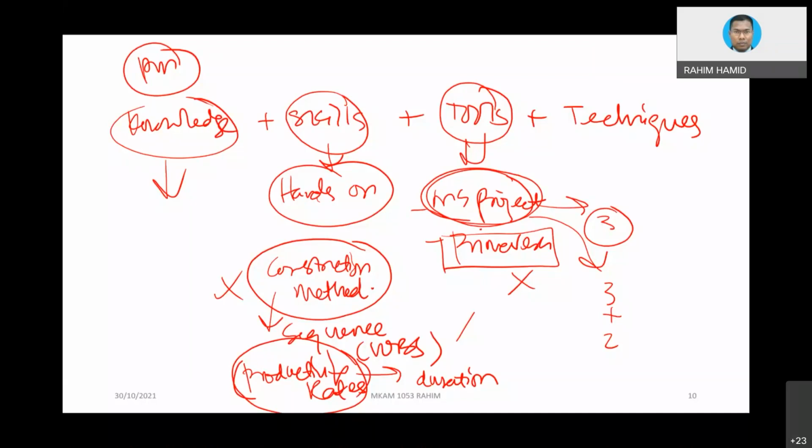Okay, all right. Then even Microsoft Project and Primavera use techniques. Lastly, PDM diagram. Both Primavera and Microsoft Project use PDM. We do have Gantt chart. We do have arrow diagram. And then AON diagram, activity on node diagram. And then PDM, precedence diagramming method, is the one that is being used a lot in many of the software currently.